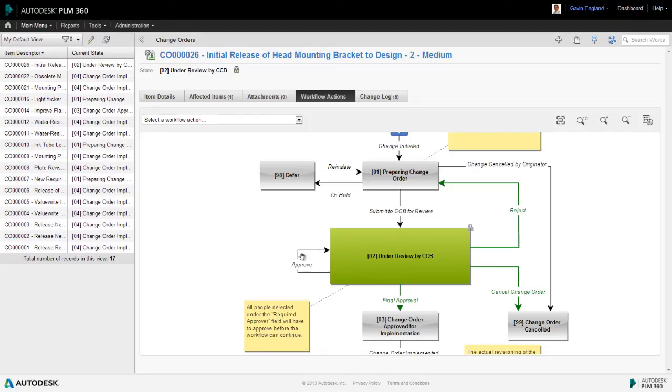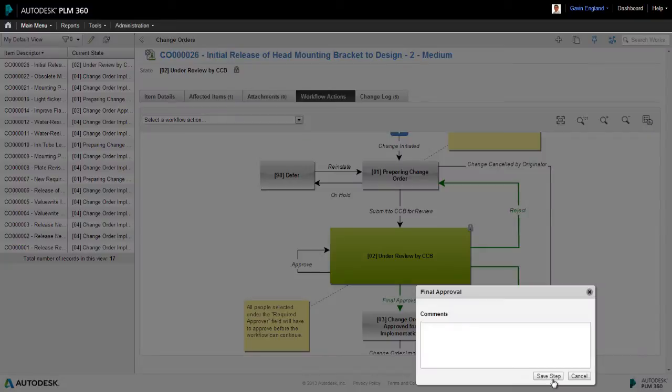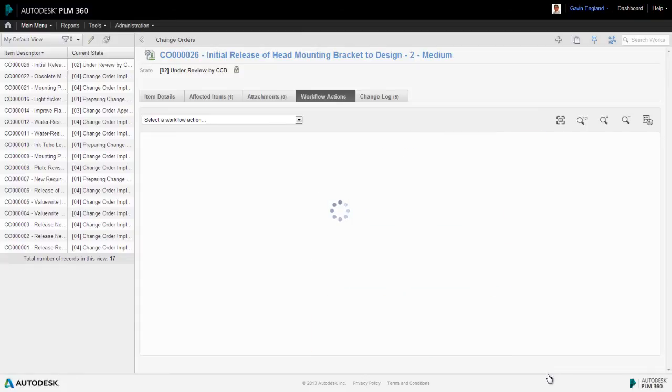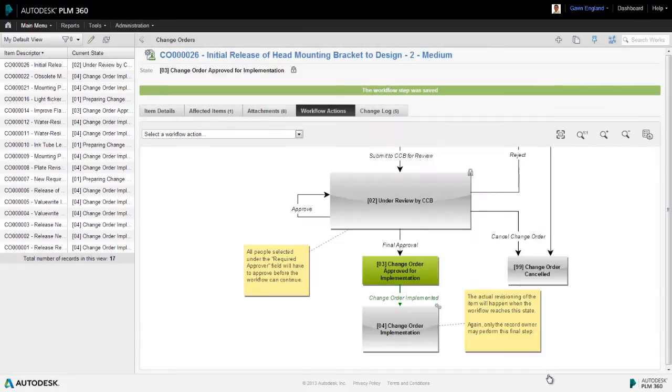He would then be able to sign off the final approval. As I'm the only approver in this case, remember I decided that earlier when creating the change order, I can sign off final approval straight away, moving the workflow to the approved state.